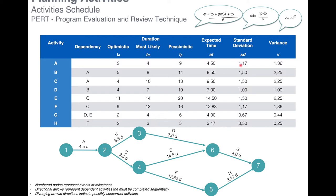Then we calculate the standard deviation. We find it by subtracting the optimistic (2) from the pessimistic (9), giving us seven, then dividing by six. This gives a standard deviation of 1.17. The variance is the square of the standard deviation: 1.17 × 1.17 = 1.36.